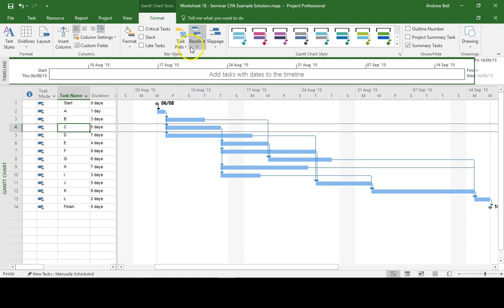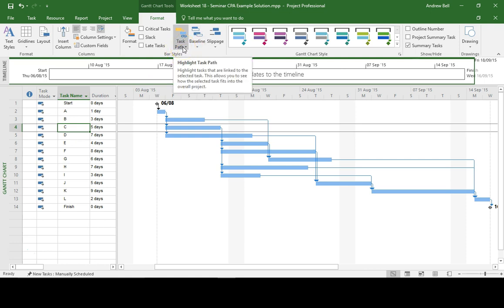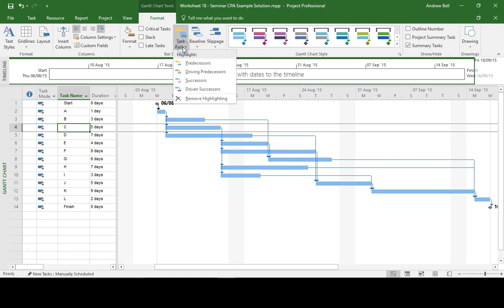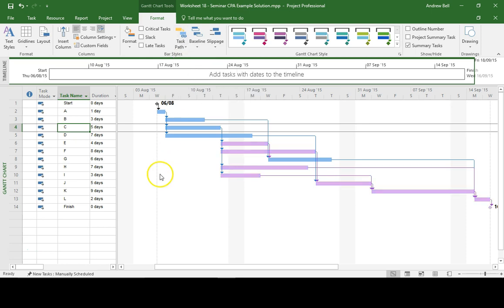So we go to the Task Path command, which is on the Format ribbon, and I ask to show the successors. And I will then see highlighted those tasks that are affected by Task C, which is the majority of the following tasks.